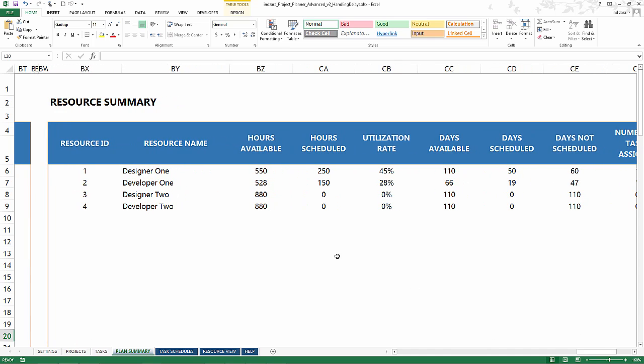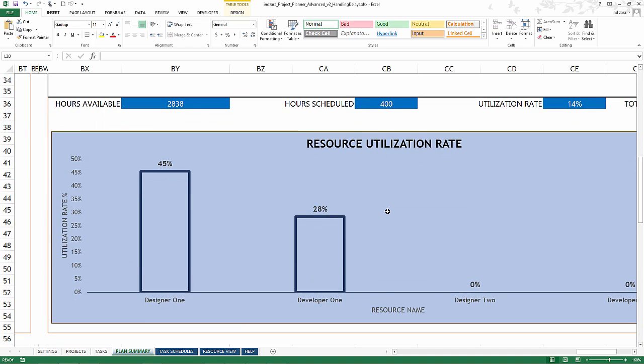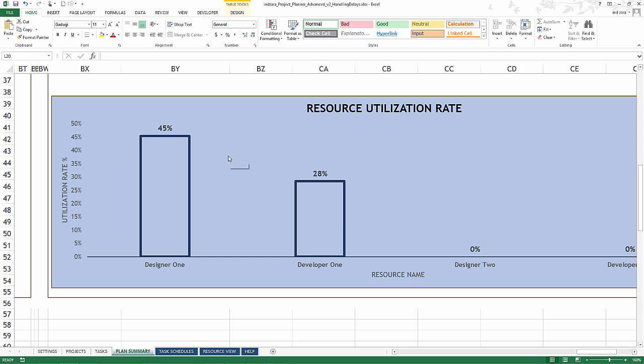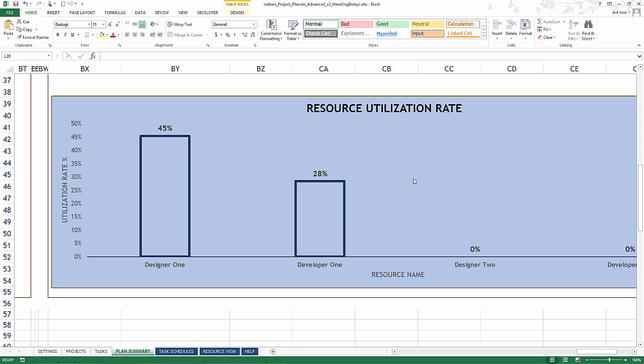This tells us what the utilization rates are for these four resources and there's also a visual representation here. Clearly Designer 1 is used 45% of the time and Designer 2 is not used at all. In this simple example it doesn't say much because we only have two tasks, but in your real project world where you have a lot of tasks and different resources being assigned, this resource utilization chart is very critical. It easily identifies which resources are being underutilized so you can give more work to that person, and if a resource is assigned 100% utilization rate you clearly know that person has been completely utilized and can take decisions based on that information.